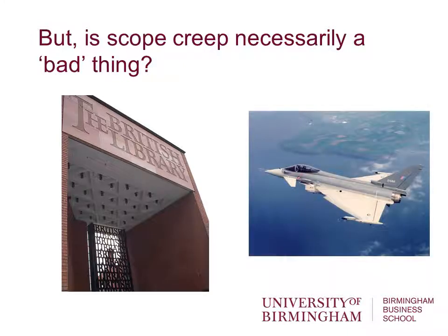The other example I gave you was the Typhoon fighter jet, designed and developed in the Cold War. The scope creep here was changing political conditions. It was designed in the 1970s and the early 80s, and then at the end of the 1980s the Berlin Wall came down, Glasnost happened, and suddenly its purpose, which was to defend Europe against the Soviet threat, no longer existed. It had to have a new purpose, or possibly a new purpose.